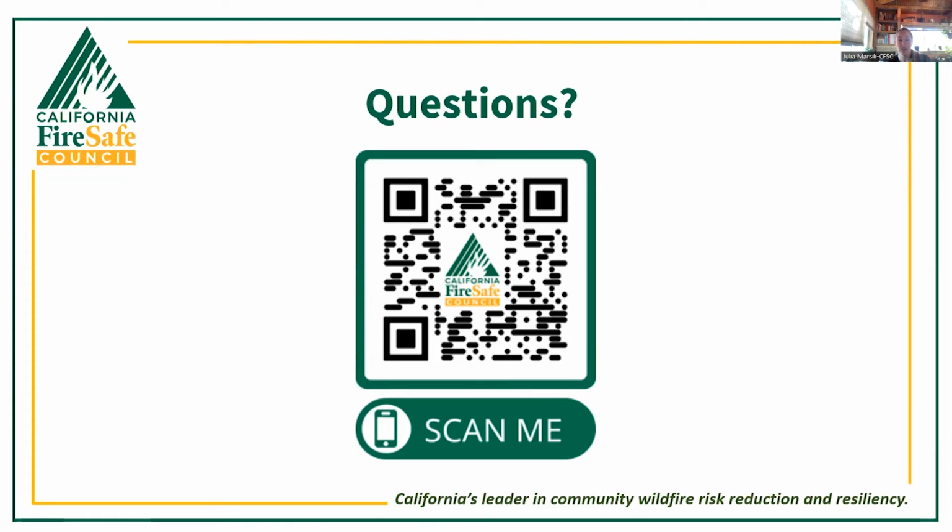And that modification process is for both the budget and the work plan. So if there are any changes to your work plan, if your county coordinator designee changes over the course of the project or something needs to be adjusted, we can do a modification on your work plan. You are going to be in touch with your grant specialist a lot throughout the course of this grant, probably more than with other grants that you might be managing. So there's always time to bring up those conversations and discuss if maybe things aren't going exactly according to your application timeline or work plan.